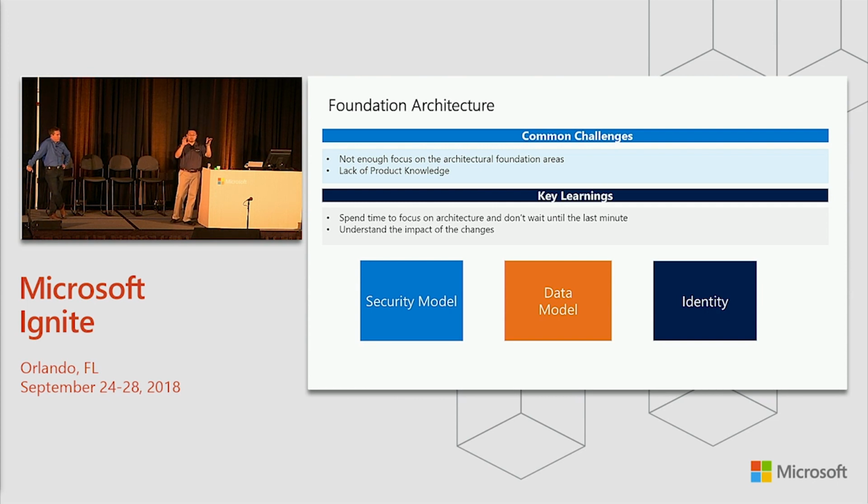The data model is like the structure or framework when you're building a house. Your data integration and data migration all leverage the data model you have in your system. So if you have it wrong, or you haven't defined it up front and put it in change control, what we often see is the development or functional team keeps changing the data model, which impacts the integration team and data migration team and all the work they have done. They ask, how come my data migration and integration worked yesterday and did not work today? Because the data model changed.